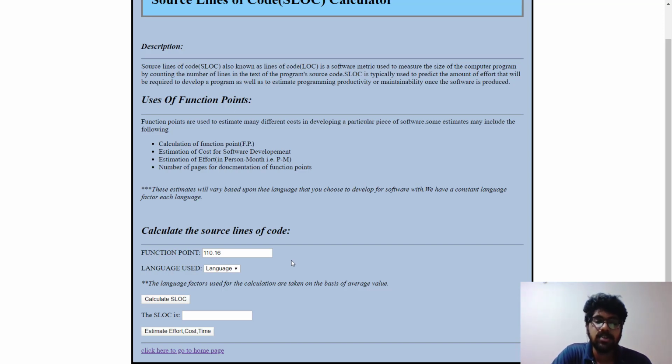For example, let's consider the language C. If we write 10 lines of code, when it gets translated to, for example, COBOL, it might be a lot, because considering 8086 and hardware programming languages, their lines of code are much higher and very basic. Each line of code does a very basic task. So we need to normalize the number of lines according to the language.